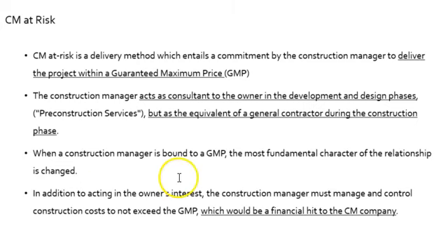In addition to acting in the owner's interest, the CM must manage and control the cost not to exceed that GMP, which would be a financial hit to their company, so they are at risk. Okay, so it's two-sided there. So they move from the consultant capacity into an at-risk capacity.